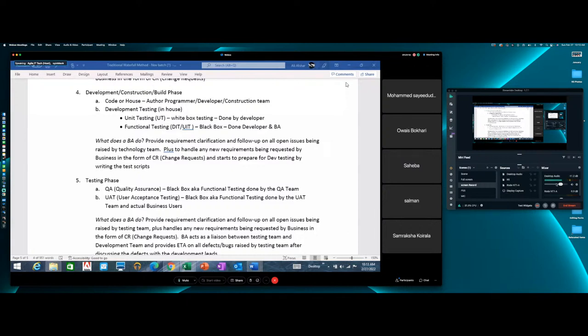Remember, you're supposed to be sending me reports on a weekly basis regarding development that has a dev start date and a dev end date for the login module? Mm-hmm. When that dev end date comes for the login, what is the start? The start is for your dev testing, correct? Correct. So that report is coming to me on a weekly basis. So if you are delayed by 2 weeks, why am I not aware of it?